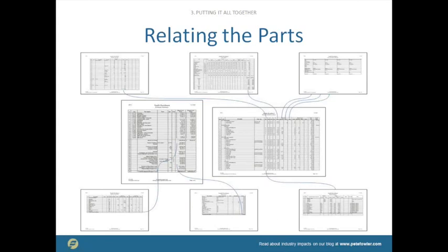Part of the reason for that is that the material and installation for the windows is going to cost $9 million. That would be on the summary page, where you'd have a windows section. Then you would go into the details, and under there you would have windows and the materials.